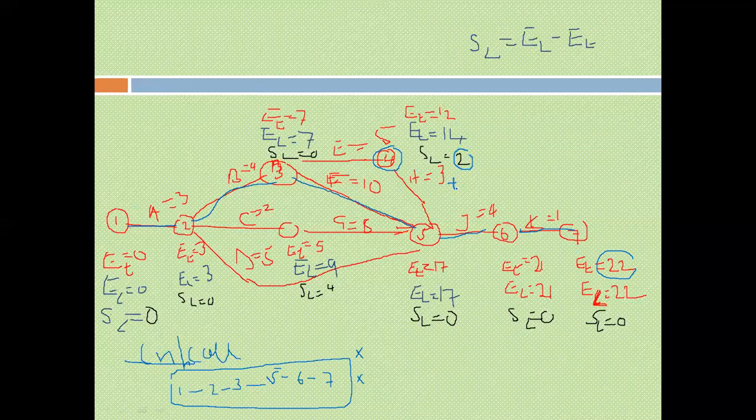Instead of completing it on the 14th week, you can begin H when it is 3 weeks to this time. So that is possible. Events like this can be delayed by 4 weeks and they are not affecting. But any event that is on the critical path cannot be delayed.